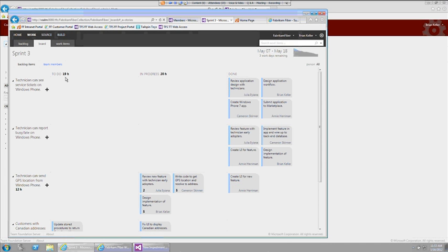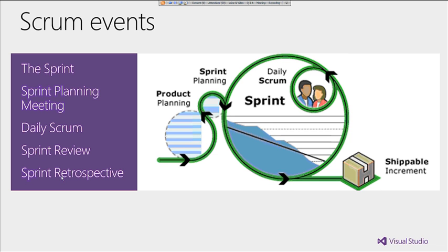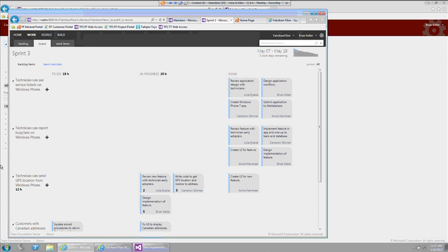And the retrospective is the final item, which right now I'm still working on how to enable and capture into TFS. In the past, sprints used to be a work item, and they had a description field where you could add some notes about the retrospective. Since we don't have that anymore in Visual Studio 2012, what I'm doing now is I will create a new task, call that task retrospective and attach it to the sprint. And in that, I'll have the action items to be improved for the next iteration or sprint. Okay, so going back now to the presentation itself.